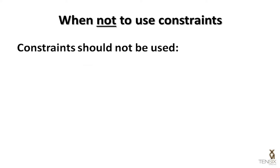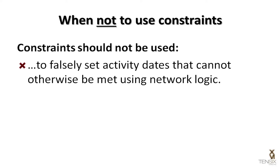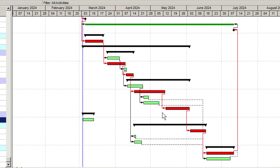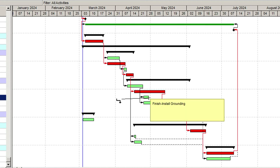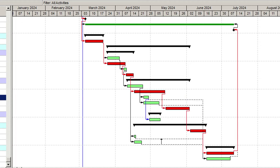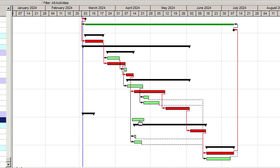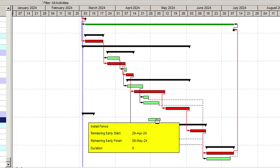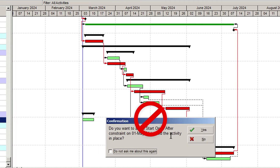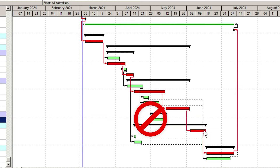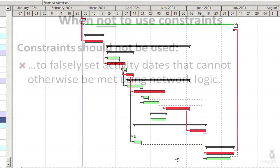Constraints should not be used to falsely set activity dates that can otherwise be met using network logic. Dates should always be calculated by Primavera P6 based upon the relationships activities have with other activities. If there are no external or internal restrictions on the activity, constraints should not be used to lock in desired dates.